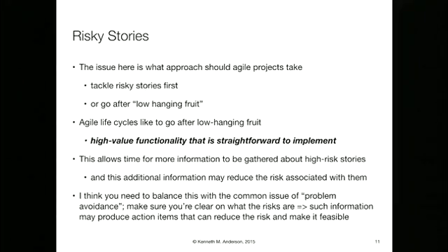Typically, the sweet spot is high-value functionality, so it has a high priority, and you understand it. It's straightforward to implement. And that allows you to deliver value to your customer pretty quickly. So it's natural to go after that. And this isn't necessarily a bad thing. It becomes a bad thing if you consistently do it so that the risky story is just put off until everything else is done. It's not a bad thing if you're acknowledging, yes, I have this high-risk story. I don't have enough information yet to understand how I'm going to tackle it.